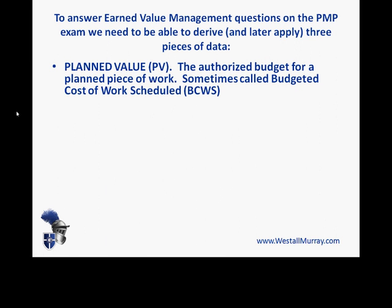Let's talk about those three pieces of data that we need. Firstly, Planned Value. Planned Value is the Authorized Budget for a Planned Piece of Work. That's why sometimes you'll see Planned Value referred to as the Budgeted Cost of Work Scheduled — that version of the name helps you remember exactly what it is we're looking for here.